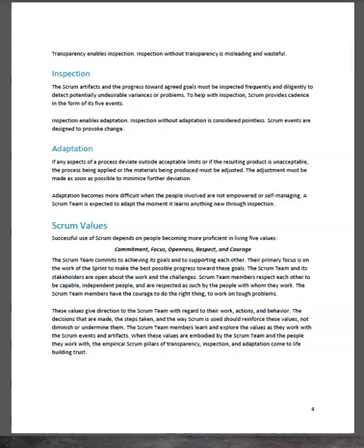Adaptation. If any aspect of a process deviates outside acceptable limits, or if the resulting product is unacceptable, the process being applied or the materials being produced must be adjusted. The adjustment must be made as soon as possible to minimize further deviation. Adaptation becomes more difficult when the people involved are not empowered or self-managing. A Scrum team is expected to adapt the moment it learns anything new through inspection.